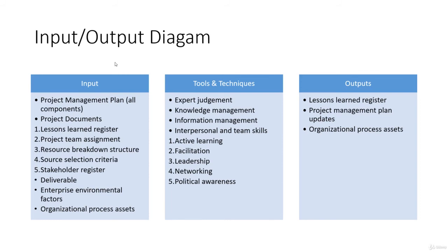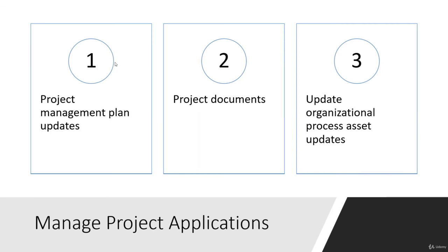Just as you receive a lessons learned register as input, you are going to produce one as output. Then you have project management plan updates and organizational process assets — any updates you make to the project management plan, and any documentation you create, will be recorded as organizational process assets. For example, if you started using Scrum and created a product backlog template, that will serve as a template for other projects.